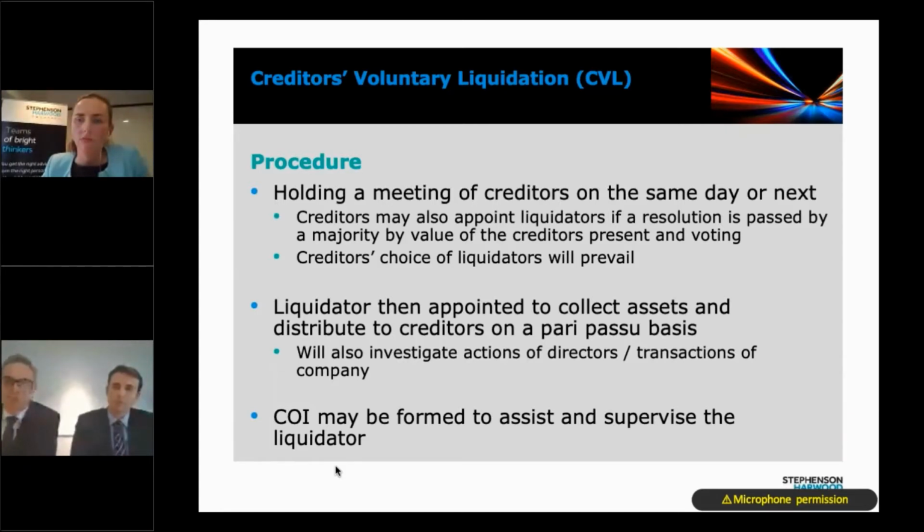So yeah, do send a holding notice reserving your position, and then you should look very, very carefully through all the various elements that we discussed, make sure the circumstances fit within the force majeure or not, as the case may be, and then respond in a more fulsome manner to either accept and understand the position that the other side is taking, or to push back and say, we don't agree, and these are the reasons why we believe you should be performing your obligations under the contract.